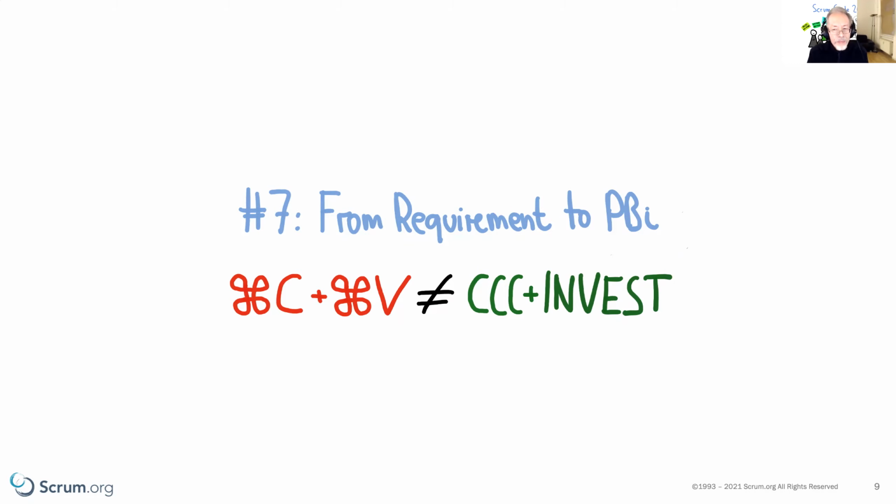And this is actually the purpose of creating product backlog items: having a collaborative refinement approach, getting everyone on the same page. Why are we doing this? What are we doing and how are we doing this? This is essential for actually creating value for our customers. Think about the old approaches from Ron Jeffries, like card, conversation, confirmation, and of course, Bill Wake's INVEST principle. This is the purpose. A product backlog item in general is a token for having a discussion within the team.